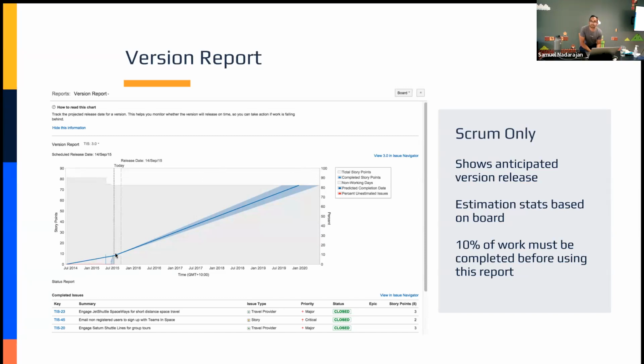So unless you have a Hail Mary happening here, which you're not for a party team, you need to adjust your expectations, right? And so this would tell your team lead or your team to say, okay, I either need to change the release date for this version to sometime later in the future based on what this report is telling me, or I need to cut the scope, right?